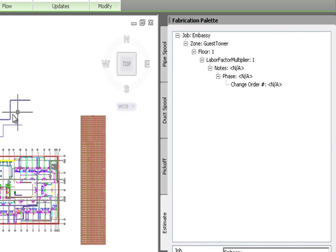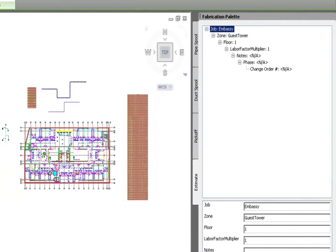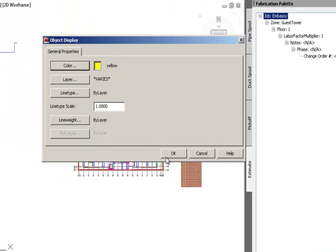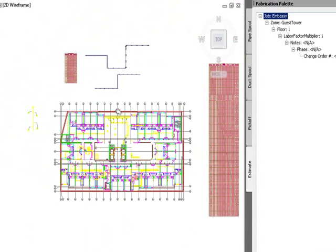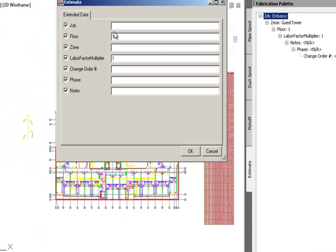In the tree structure I can color-code work. For high-elevation work I select the top level and set everything to yellow in the color palette, indicating I've taken everything off in that drawing. Then I attach more data to another section — same job, same floor, but a different zone such as 'Atrium' — and adjust the labor correction factor up by 25% with notes indicating that work is 30 feet above finished floor.